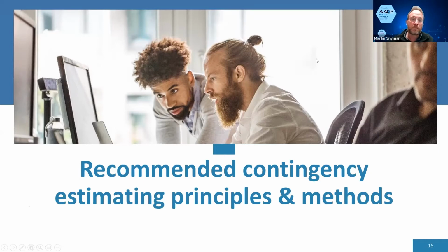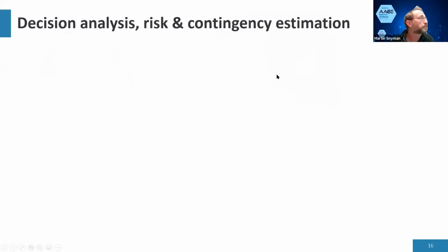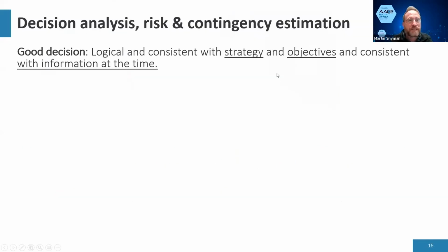Okay, good. So I'm going to start talking now about the estimating principles under RP. The first thing one needs to remember when talking about contingency and the whole process is the question: how much is enough? How good does my calculation have to be? When do I stop the risk guys' paralysis by analysis? The answer lies in whether you can make a good decision. Will your decision to go ahead with the project or not change if you have more data? If there's a good chance that you won't change your decision, then you stop the process there.